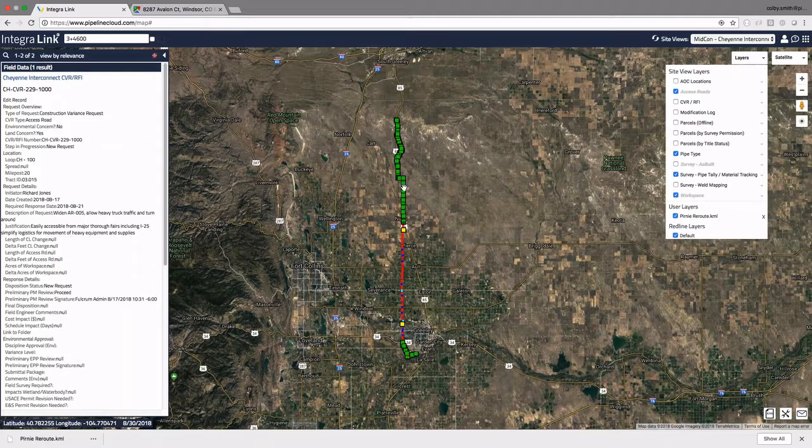up on the map. So we've got surveyors out in the field, again with mobile devices, and every single time a joint of pipe is being offloaded off the back of a semi and laid down on the right-of-way, one of those guys is capturing that joint of pipe and essentially moving its logical location from the pipe yard or maybe in transit or whatever it was to laying now on the right-of-way. But the other thing that it tells us, right, is it gives us a pretty clear picture of progress, right? We can see where stringing now has occurred as part of the construction on this project.